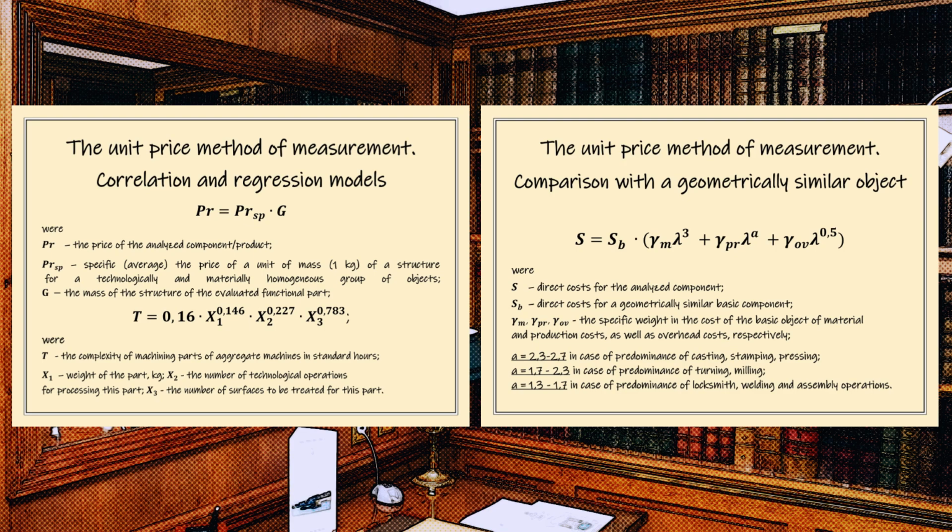For the pricing method used on the unit price, it makes no sense to form a separate calculation form, since the method is firstly auxiliary and secondly has an extremely low degree of calculation accuracy. The isolated practical application of this method is usually practiced at the pre-project stage, starting from the technical proposal stage. This method is used as an auxiliary method for the formulation of coefficients used within the framework of the coefficient pricing methods.